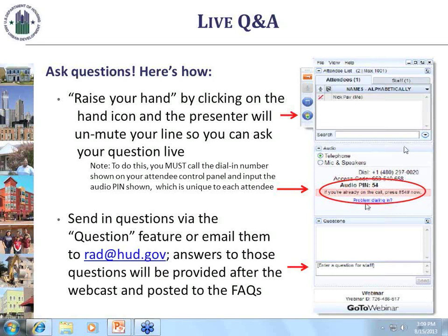On replacement housing factor funds, the future RHF the housing authority is going to get, not for RAD units. I understand RAD doesn't trigger RHF, but previously disposed units are getting RHF. I think you've indicated that those future RHF payments could effectively be added to the RAD contract rent. I wanted to be sure whether that's just the first 5-year increment of RHF or both the first and second. Both increments.